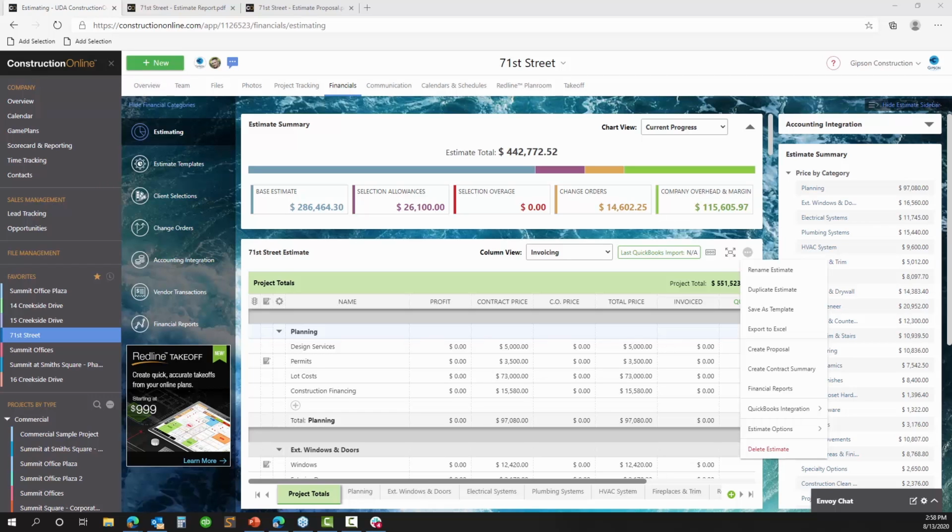Well, the thing is, your general construction work is probably going to include a plumbing and electrical section in the estimate. Why not break out a larger scale estimate into smaller estimate templates for each type of work for those other divisions? And then you can, of course, expand and flesh out the line items inside of the estimate to cover the unique components for the more specialized divisions, without affecting the overall connection point to QuickBooks.